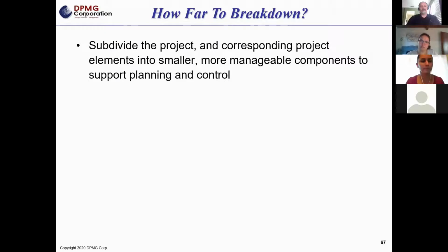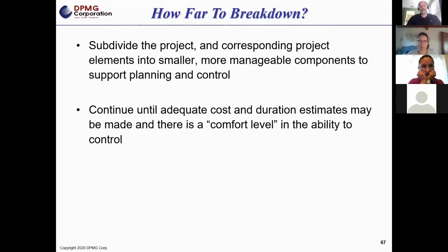Again, subdivide the project into the corresponding elements down to the lowest level that you think you can manage as a team. There's no need to go down to the lowest individual level or down to a work package. One of the guidelines is to get down to a level where I can actually come up with an adequate estimate for cost or duration or estimated hours, okay? So let me give you an example. Let me think of something.